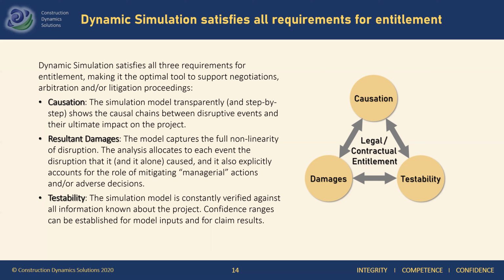They show how different variables of the project interact with each other. So with a system dynamics model, we can actually develop a detailed causal narrative showing step by step how each disruptive event affected all the areas of the project.